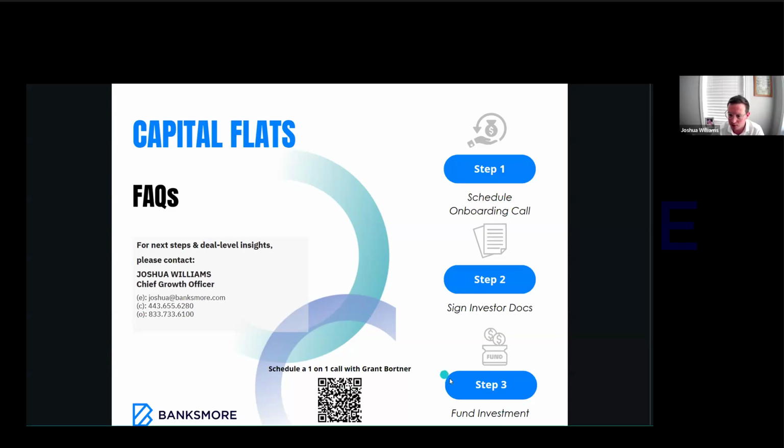Yeah, I'll touch on that one, and Clint, you can jump in here. So if we take the full 15 months, and honestly we're anywhere between 12 and 15, but we want to give ourselves 15 months for construction here. That puts us in March 2026, 30% occupied. We will hit the spring lease up season. I think that's critical. And then from there, if we're at 25 or 30%, we're aiming to have 10 to 15 new leases per month. So we'll be pushing for a refinance, likely by July of 2026. Generally, any kind of refinance process takes 2 to 3 to 4 months, so that takes you all the way up to the 24 months.